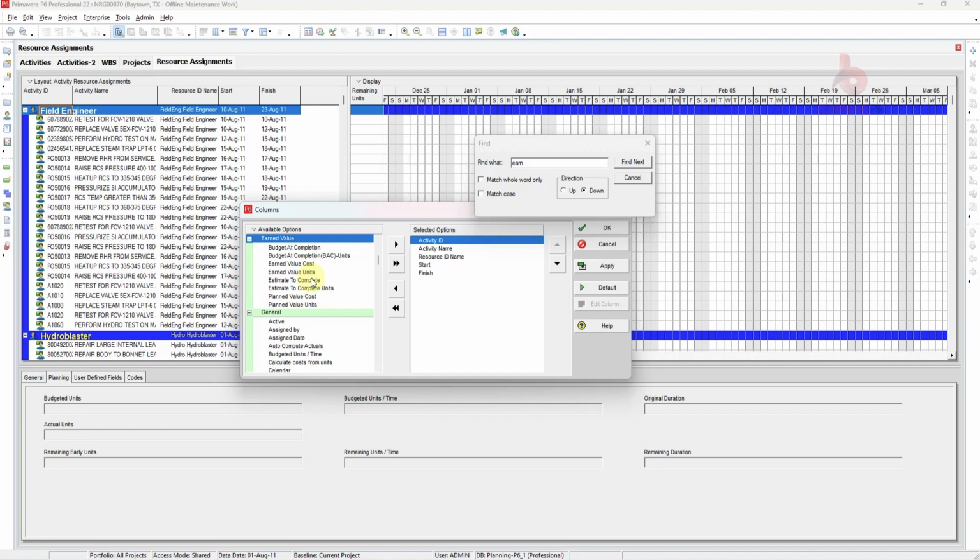So again, the next one, the 12th, is export project in IPMDAR format from PPM and SQLite database. You can export projects and their associated activities and resource assignments in IPMDAR format for P6 Professional when connected to a PPM SQL database.